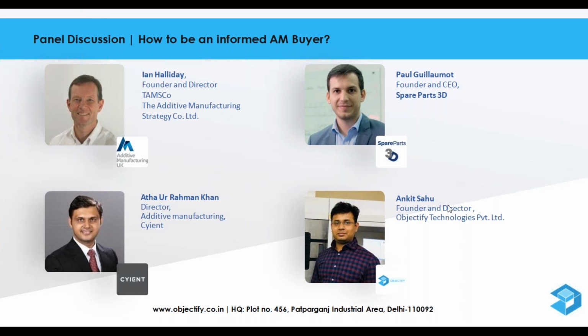With respect to production, I think more and more customers are consistently asking for evidence of expertise. Now, this can be in terms of examples of the previous work that we have done, but more frequently we are seeing that this is in terms of a proper demonstration of the machine and process consistency by doing coupons and by planning test builds and then making sure that the values that we see for our test coupons are falling within a range and falling within a range consistently. So I think these kind of qualifications are becoming the norm before the customer actually gives you a part for production using additive manufacturing.